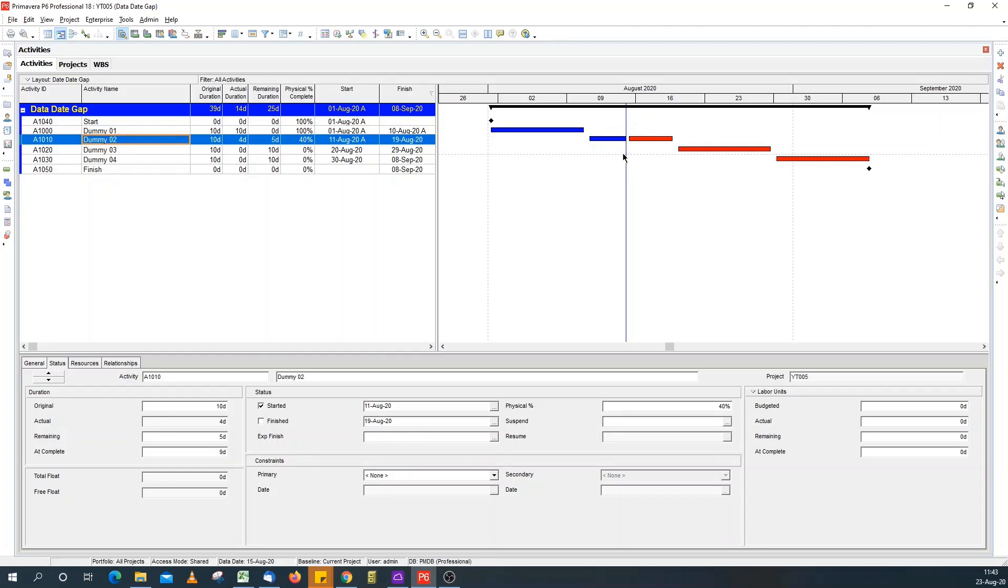But if the calendar is not a 24 hour day calendar, then it's either out of sequence logic or a problem with your time period.